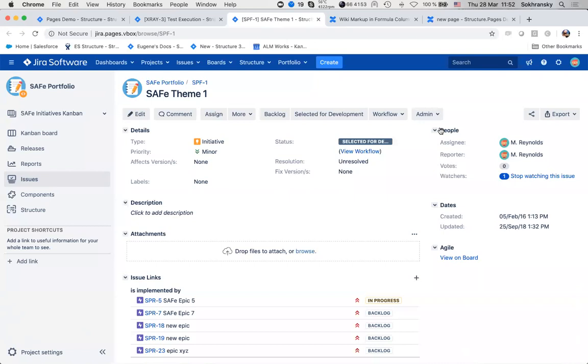If you have the way, in your setup, to convert them to a single unit, like you know that if this team has 10 story points to do, it means it will take them a week, and the other team just has a 1 week estimate, you can produce a report that will take both of those things into account and tell you, okay, we have 2 weeks left or 20 story points, whatever. So again, we offer this flexibility, and I think this is what makes Structure different from some other solutions.